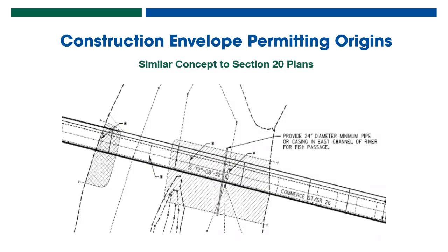I do want to acknowledge that not all permits in design build are expected to be obtained before let. That has been a practice that has been, I believe, pretty well implemented for us within GDOT. But I will say that some projects may get pushed past the actual initial let date for design build, and that a permit authorization would be obtained after that. That NTP 1 especially. So design build had a need for trying to anticipate where a contractor would go without dictating to the contractor not just his means and methods for access, but also without having a complete design, if you will. We aren't working with 100% plans in the design build realm.